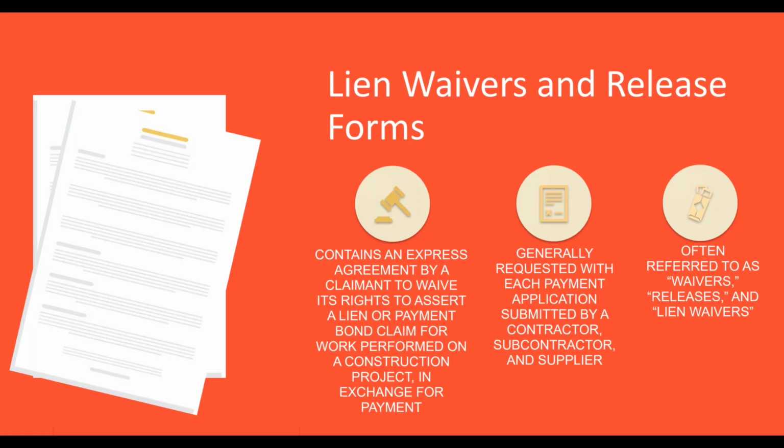Contractors are often required to submit these as a condition for payment, and that would be either under the terms of the contract or under statutory law. And the name lien waiver and release forms is inconsistent across the US, unfortunately. So it can get a little confusing when people are referring to these forms. In my experience, I've heard them referred to as waivers, releases, and lien waivers. The next slide.